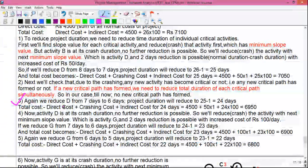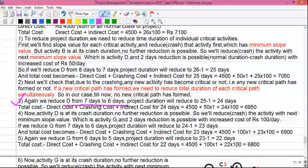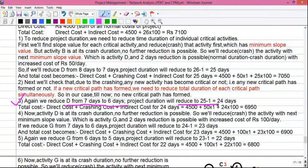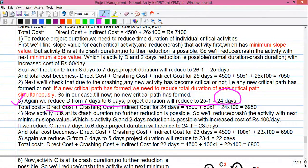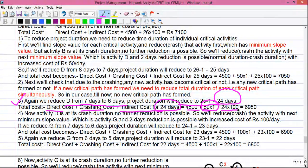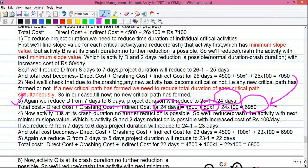Step 3: We reduce activity D again from 7 days to 6 days. The project duration reduces to 24 days. Total cost becomes: 4500 + 50×1 + 24×100 = 6950 rupees — again reducing the project cost by 100 rupees.